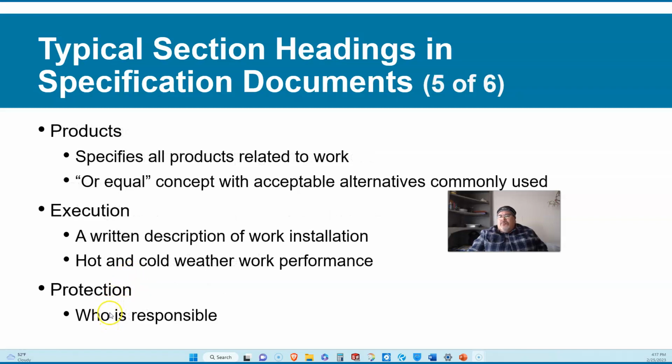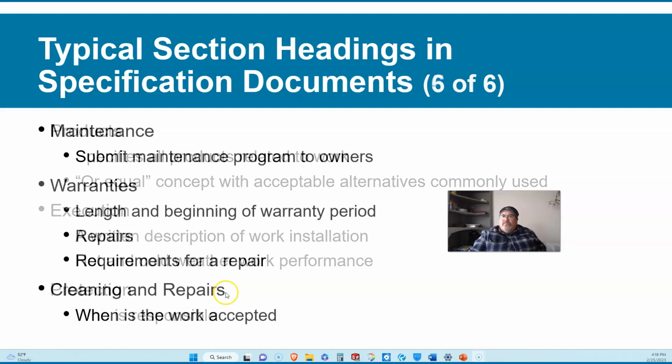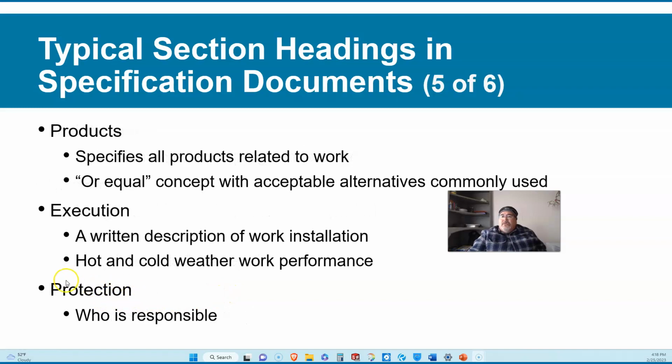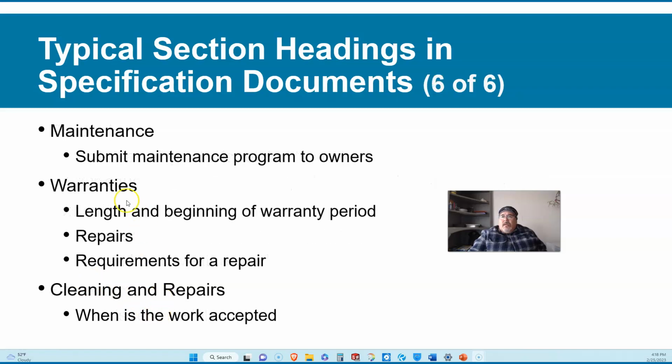And protection, like who's responsible for, once you've delivered the material to the site, who's responsible for it until it's considered complete. As the subcontractor, my work is delivered to the site and it's not considered done until we have agreed that it's done. And up until that point, what if someone comes onto the job site and steals the material? Who's responsible? Maybe security protection is the responsibility of the owners.